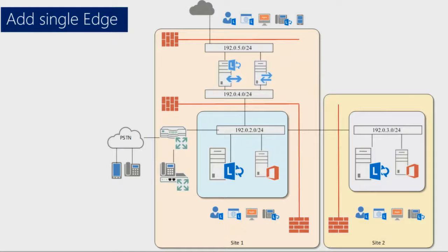The documentation that we had to put together to provide to that outside third party to configure the firewall the way we wanted it to be and not the way they wanted it to be took us longer than deploying the Edge servers did. It had to be in a certain format, the charts had to look a certain way. We had to have a column for direction, and then we had the directions backwards because they read it backwards. We went through that probably for a good week.